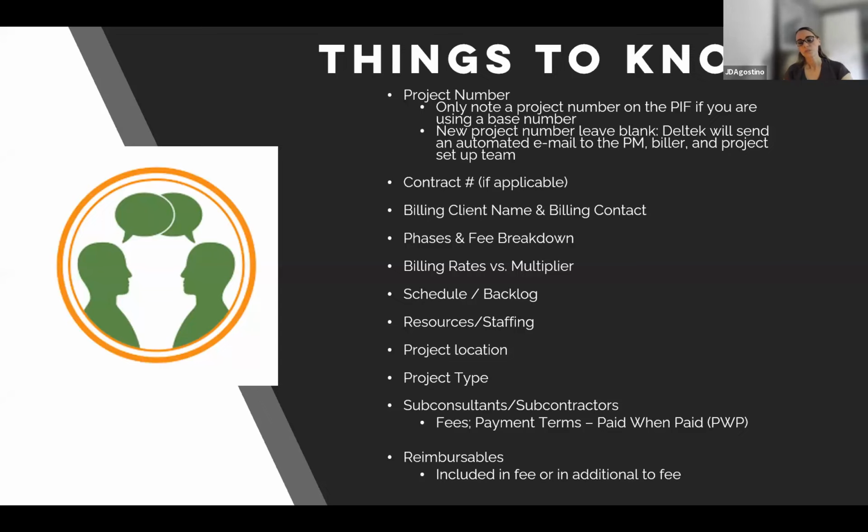So that means you're handing in that invoice to accounts payable, and then you are doing your billing, giving it to your biller. The biller is sending an invoice out to the client, the client pays us. And then once LaBella gets paid, then we send the payment to the consultant. So in case you didn't know what those terms meant, now you do.